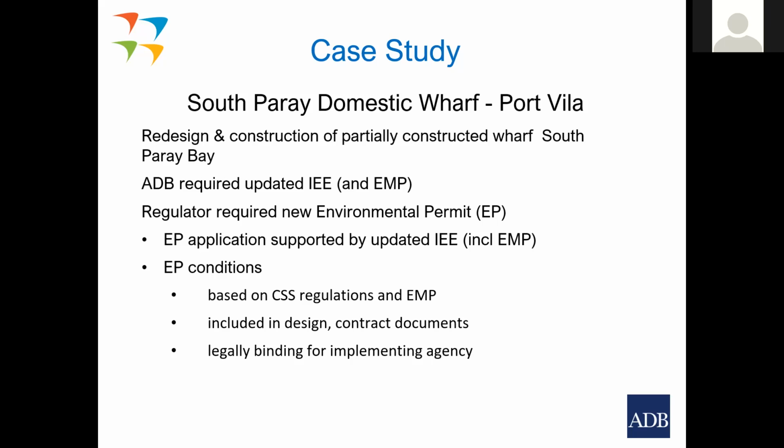And as far as the implementing agency is concerned, the environmental permit conditions are legally binding for the implementing agency. So it's important that they are included in the contract, and it's up to the implementing agency to make sure that the conditions of the environmental permit, as per the Environmental Act or whatever regulations it is, are complied with. So the agency that is implementing a project must comply with the country system.